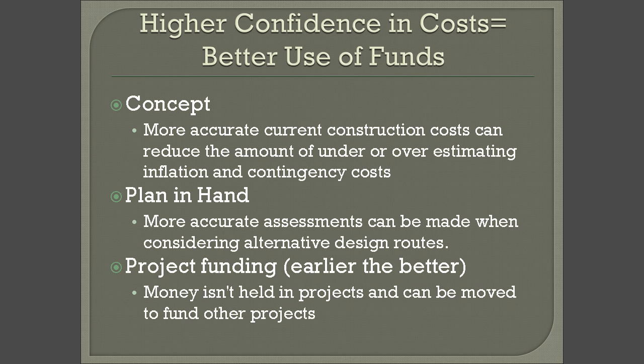Now in historical estimating, it would take maybe five to 6 months to really look at those and take that into account into our average bid, because it could have been just a fluke. But because we saw that in our award reviews, we were able to investigate and see why that happened the next day. In fact, we made calls that night to make those decisions on subsequent projects. So when you have that accurate estimate of what the project's going to cost in real time, then your project fundings are better utilized, better funded.